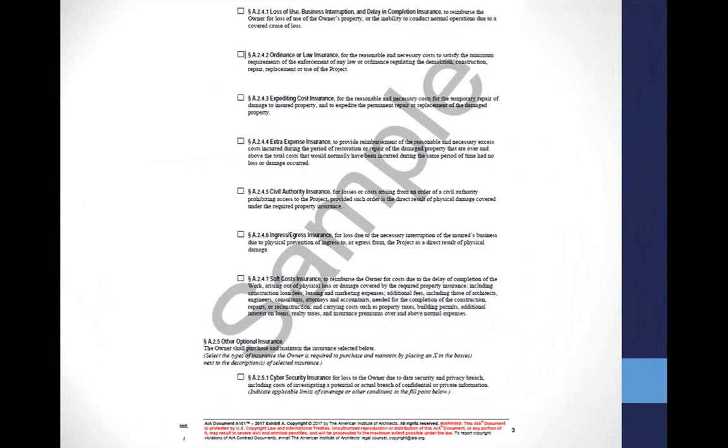You can't add this after the job starts. It doesn't work that way. But if you have a very robust specification, you go into the market, you can get this stuff for almost no difference in the rate, right? They'll give you that 5-cent rate, whether these are in there or not. And so in my opinion, the more you can get of this, the more likely the outcome is going to be smoother.